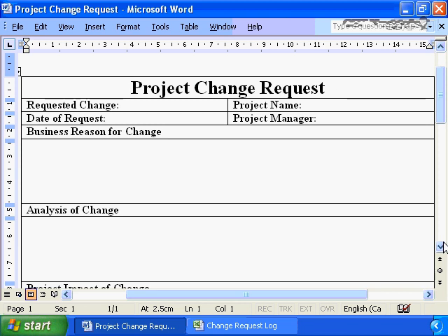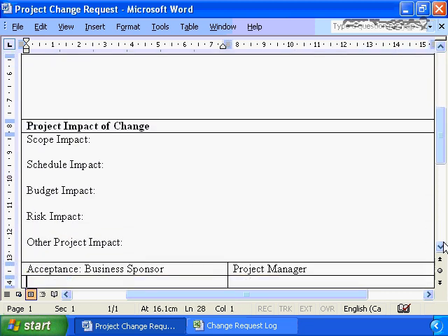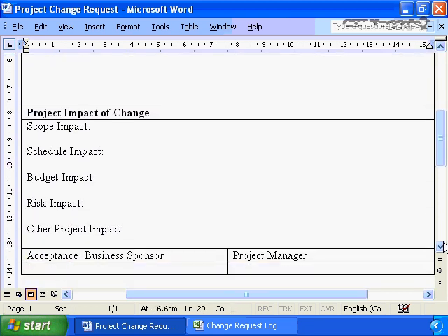If it's a change to that, don't take verbal confirmation. Verbal confirmation can be misinterpreted. Verbal confirmation can be forgotten. Verbal confirmation can come from the wrong person. They're not in an authority position to make the request. If it's a change to an approved, signed-off document, it must be documented through the change management process, and it must be formally approved and accepted. And then it becomes part of your project baseline.